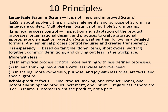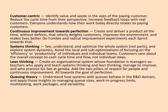The fourth principle is 'more with less' — in empirical process control, lean thinking, and in scaling. The fifth principle is whole product focus: one product backlog, one product owner, and one potentially shippable product increment per sprint, regardless of whether there are three or thirty-three teams.